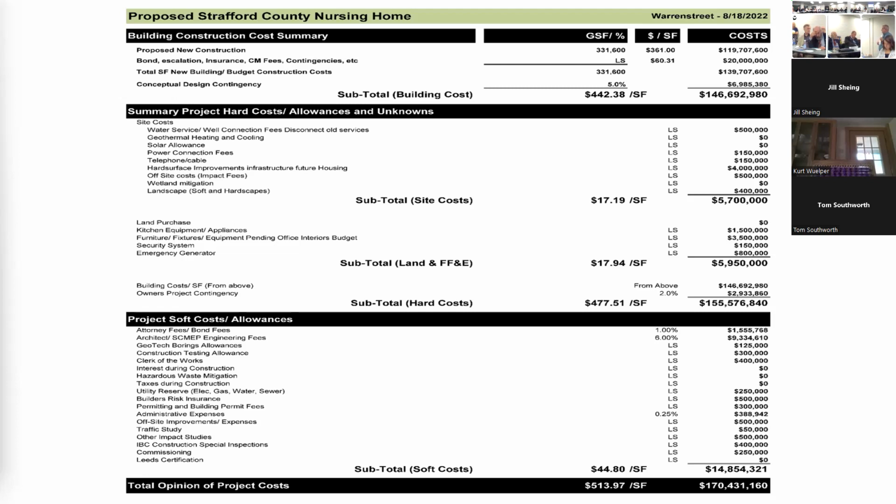There is just a little thing on the public service and the transformers. We had an electrical issue on the complex. And unbeknownst to us, probably because it's a nursing home, they have a certain number of transformers that they put aside. Because we got a transformer here in 3 days. So, you know, I'm hoping for some form of consideration, considering what they did for us before. Yeah, but those are for emergency uses. I understand that. Because nobody makes transformers in the United States, and even in the good times, it would be a year lead time, because they're almost all built to your needs. And I don't see them giving up emergency ones for a project that doesn't house any people in it yet. I understand. I'm just saying that, you know, we lucked out but we're not depending on that. We'll start ordering in advance. Yeah. It was the plan.